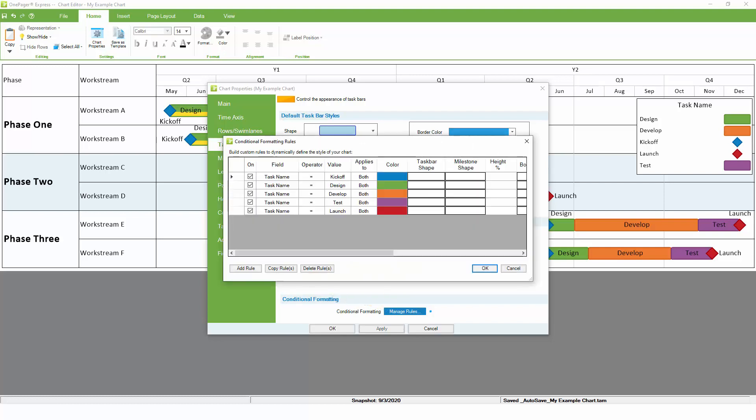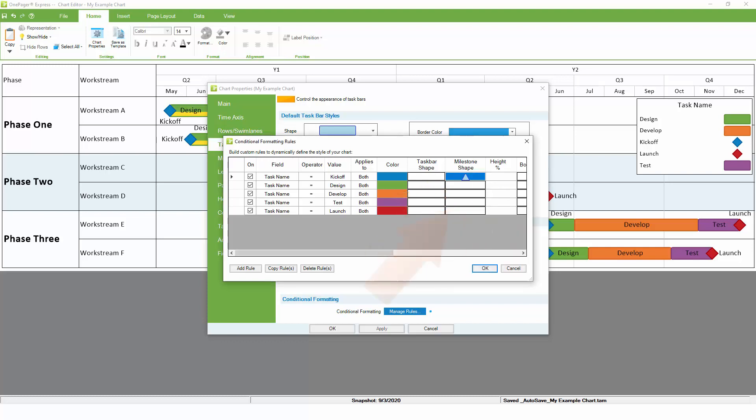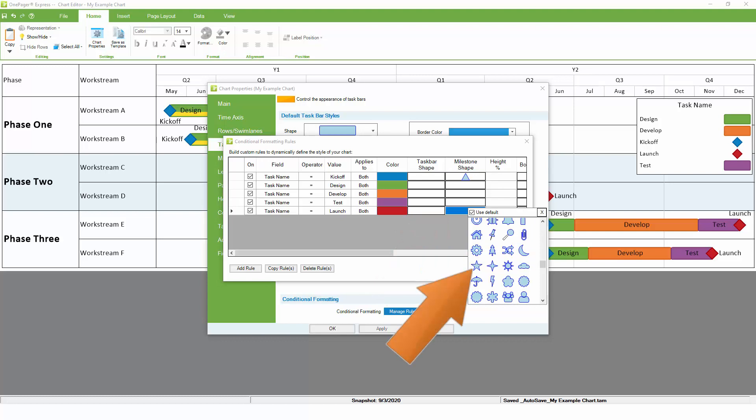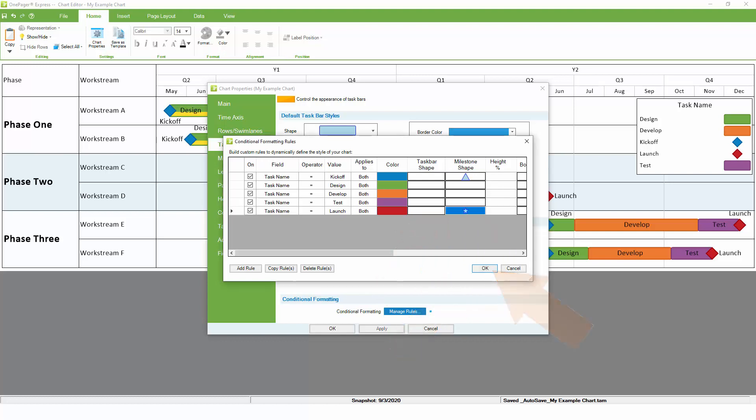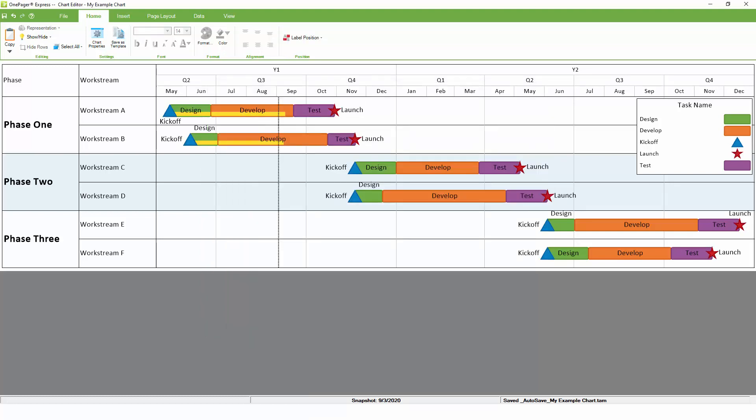Let's modify the existing rules for our milestones to not only assign a color, but also assign a shape. The kickoff milestone can be a triangle, and the launch milestone can be a star. Once these rules are applied, we immediately see the shapes change in the chart without any need for manual editing.